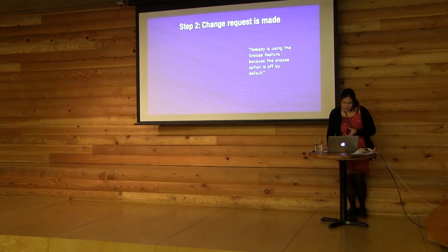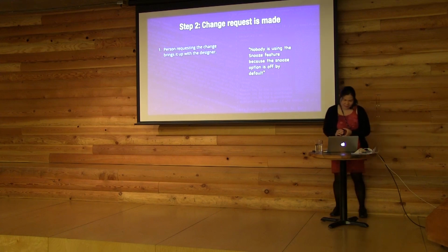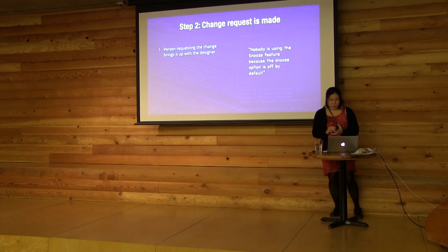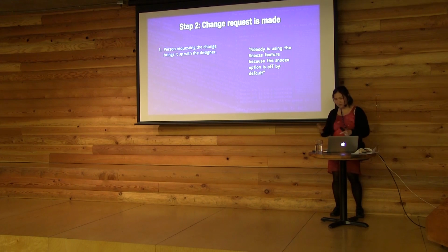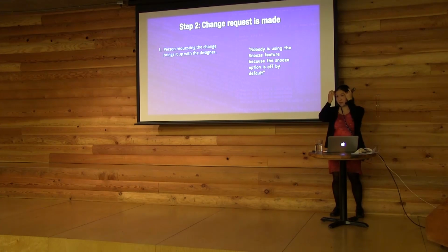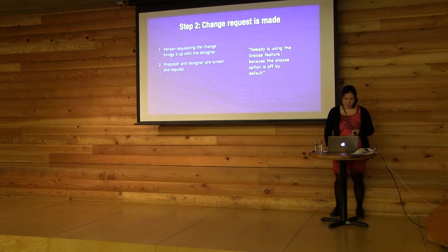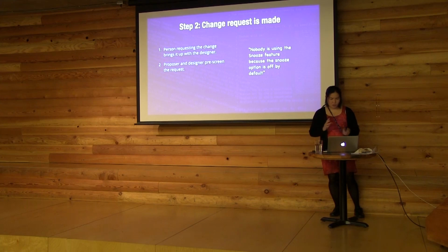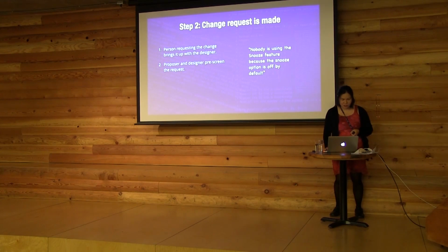What I like to have happen is whoever's requesting the change brings it up with the designer first, and the designer and the proposer will pre-screen the request. Sometimes the designer will come up with a better solution to the problem, or the designer will say that we talked about doing that. So you'll have that one-to-one discussion first.